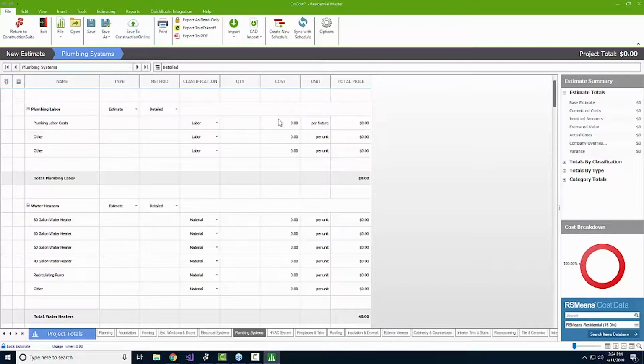Well, that's a great segue into this too, because the most important thing for me when it comes to accurate estimating, and what I see with what I'll call the experienced, profitable companies, people who have been doing business for 20 years profitably, is that these companies always do the same thing. When they're putting together their estimates, they'll put in a quantity and a unit cost.